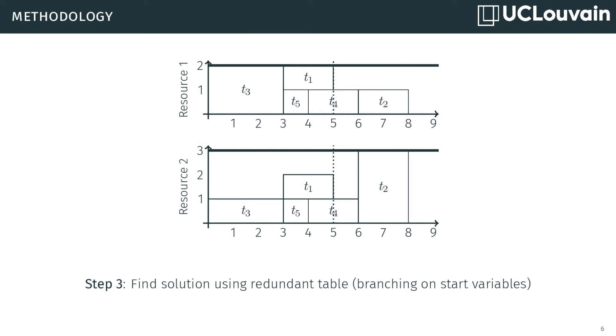The last step of our methodology is to add the table of relaxed solutions to the model as a redundant constraint. The search space is then explored by branching only on the initial start variables and by performing a minimization of the horizon.